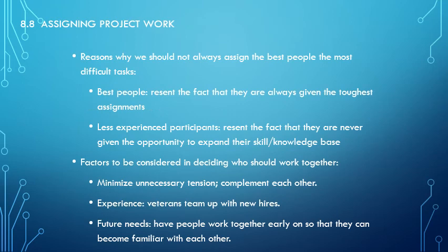Assigning project work. Why we should not always assign the best people to the most difficult tasks. They can become resentful for always having to do it. And then the less experienced people are also resentful because they're never given the opportunity. So can we somehow build a team together to show the less experienced how to do it, so that the best people then know they won't always be the ones that have to come in on a Saturday because no one else can do the job, that they've fully trained somebody else, and those other people feel empowered and more likely to want to take on other tasks in the job.